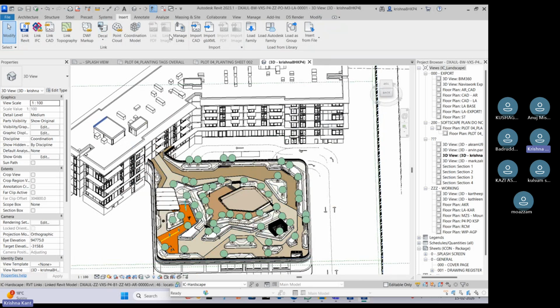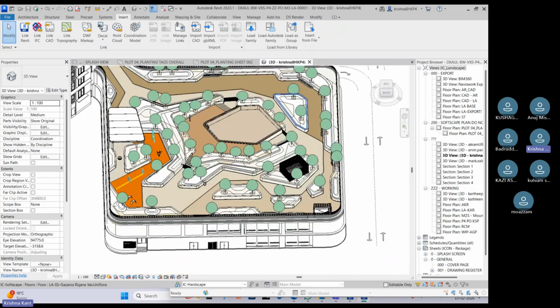Okay, and no need to do it separately. But when the contractors are different teams, like there is a main contractor, then there are subcontractors of different disciplines. Even now, in certain buildings I have seen more than 30 to 35 contractors.